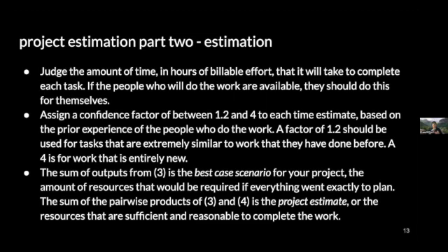And 1.2 is the scale factor for work that is very, very similar to work you've done before. Like if you're creating a web page, it's just plain text, there's no fancy widgets. This is something you've done before. You have a good basis, both psychologically and if you kept notes, you have a record of how long that task took you, and you have a good basis for making an initial estimate. So assign a scale factor of 1.2 to that.